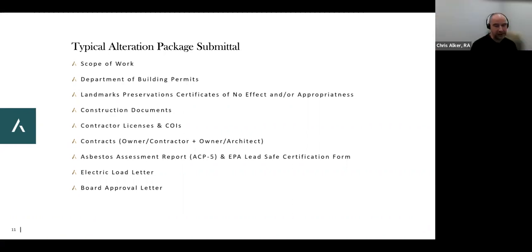It's interesting you say that, because I had a conversation earlier today with our senior vice president of operations regarding what he's calling the Seinfeld rule. My understanding is it actually came from literally Jerry Seinfeld renovating and combining four apartments for himself, and his renovation went on and on, so this idea of charging owners and shareholders who go beyond the 120, 180 days will allow them to compensate the building for that. And some owners and shareholders are able to pay that $500 to $5,000 a day, whatever the clause is.